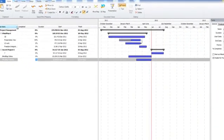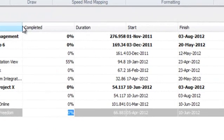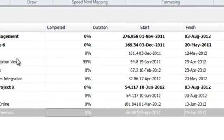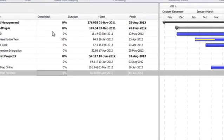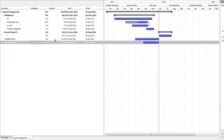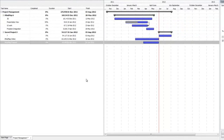Each one of your branches will have a completed status, a duration, start and finish dates. When you first go into this view, all of the dates will be defaulted to the date of the branch creation, so most likely today.